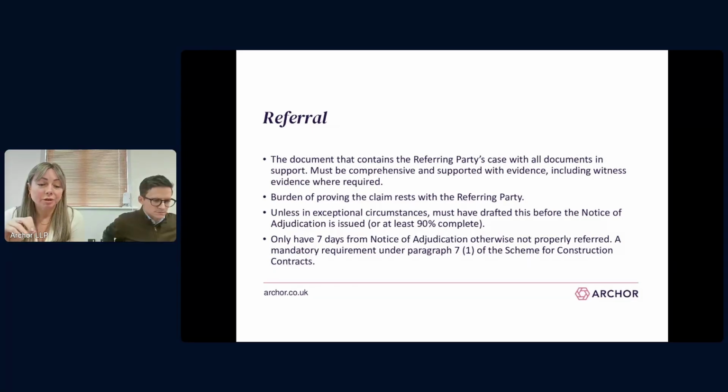Now, the burden of proof is on the claiming party. You may have heard of the phrase, "he who asserts must prove." It is for the referring party as the claiming party to evidence its claim. In practical terms, we like to have the referral drafted before we even issue our notice of adjudication, so we're not panicking to get this drafted in that 7-day period. However, this isn't always possible, but you've always got to be mindful that you've only got 7 days, so make sure you've got your referral notice, if you can, ready.